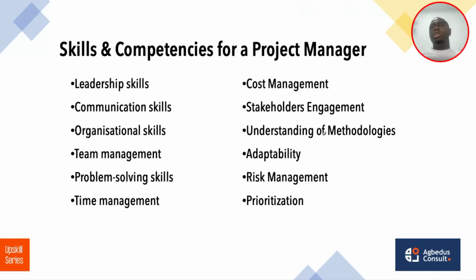Then one other skill you need is risk management. You need to be able to factor in every risk that will take place on your project. And prioritization. As a project manager, things will come and sway you off. Certain things will come and prove themselves as important, but you need to know what is the must have, the should have, and the would have. You need to know what is a must and what you don't need to pay attention to. If not, anything will come and take your time away. So these are the skills you need as a project manager.